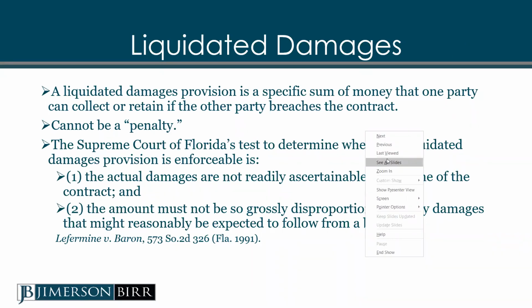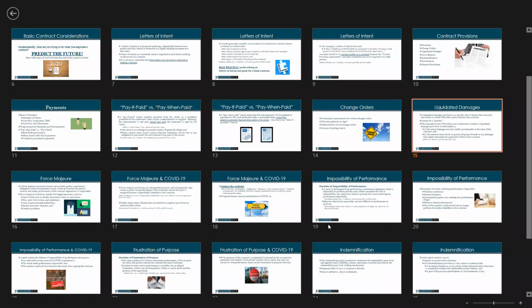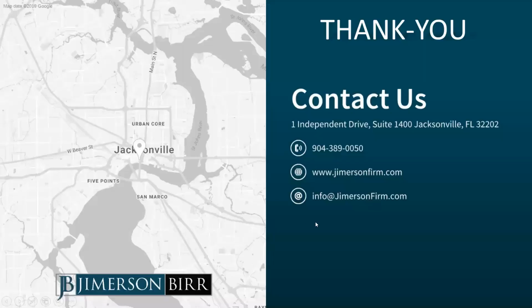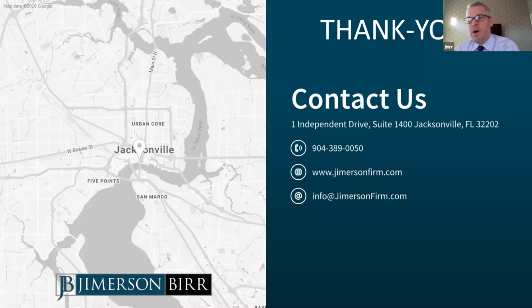So Susan says, when does a letter of intent actually become binding? She was surprised by that. She thought it was only a document to identify general terms of scope, schedule, or cost. Well, it becomes binding when a subsequent contract's not signed, and the other side who really wanted it didn't get what they want, so they make an argument that the letter of intent is binding.